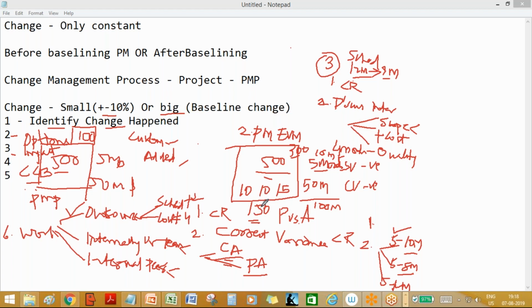First, you've identified that it's not achievable. That's the first step. Identifying the change means saying this is not achievable, that is a change. That means you want to revise the cost baseline. Second, you find the options. For example, in yesterday's discussion we had 3-4 options. One is standard productivity, 150; non-standard productivity, 105. Third option, if it's a flawed estimate, you re-estimate the remaining work. Out of those options, we took the standard performance option, and that's why the impact is 150. 50 additional we want, correct?